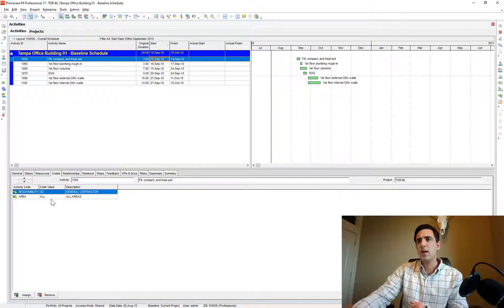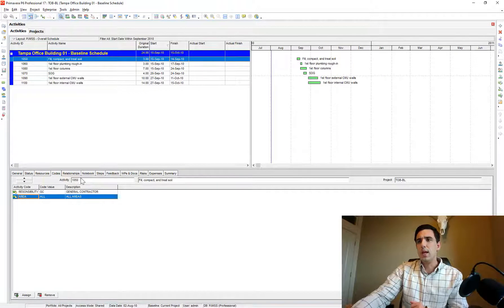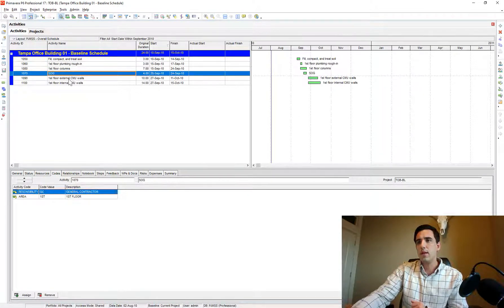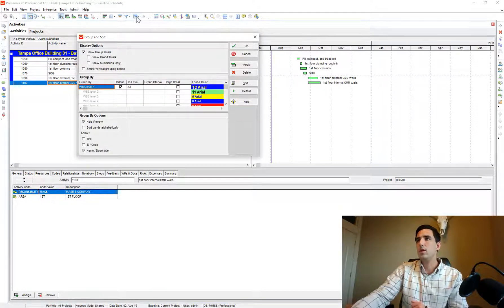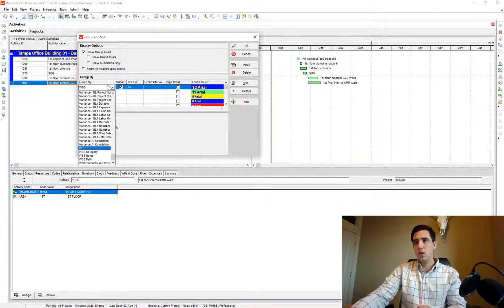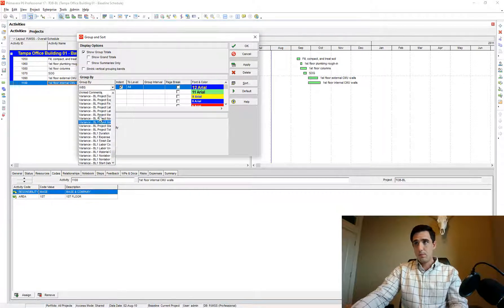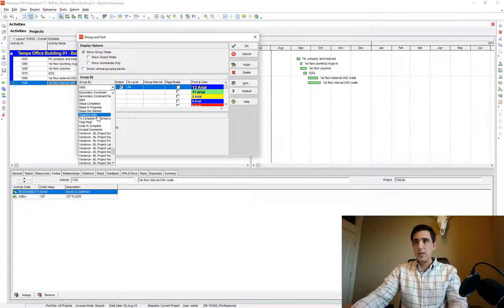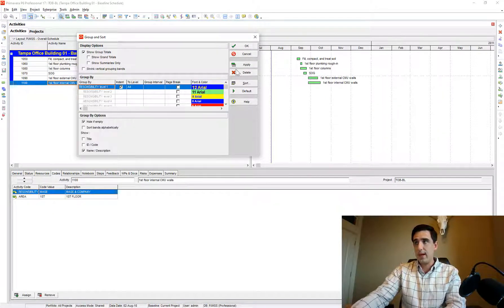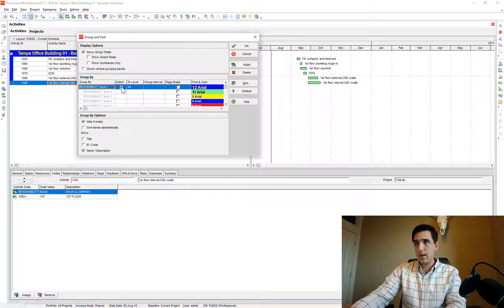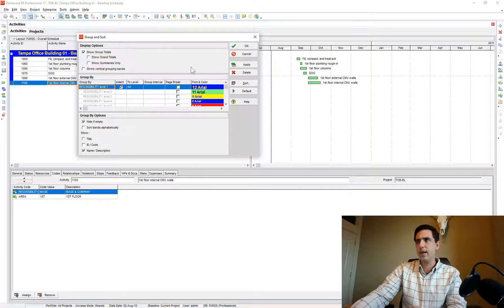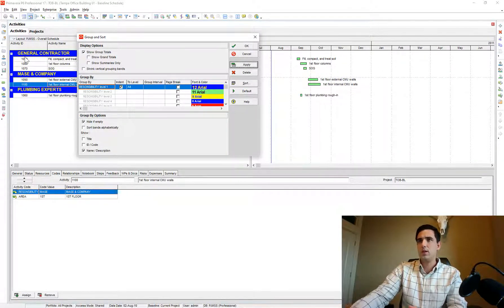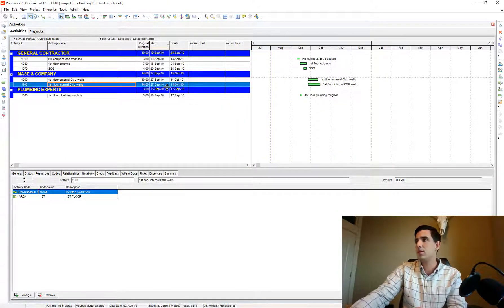If you wanted to, you can see we have a couple codes here, you know, responsibility and area. Let me see, I think all those areas are the same. If I went to, here's my grouping sort up here, and you could group it by responsibility. We can find that code there, maybe I do it by just that code. So here's those subcontractors that are responsible for that activity.